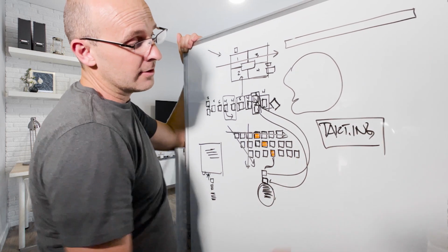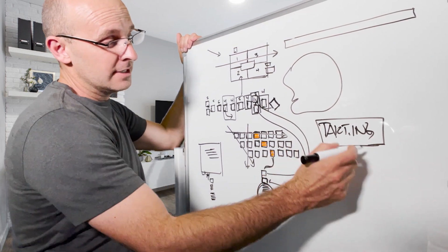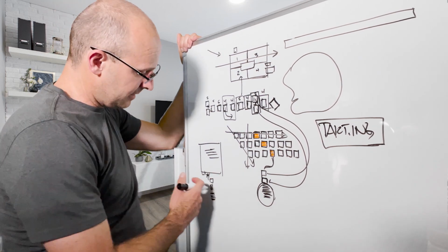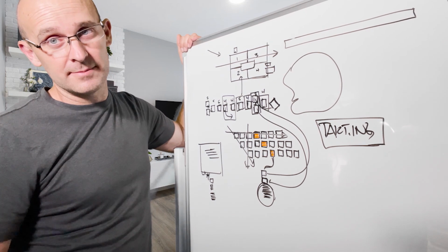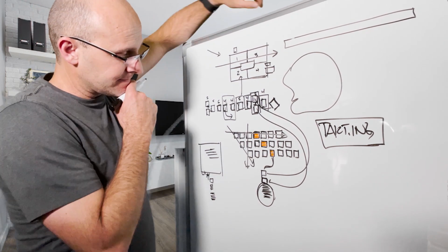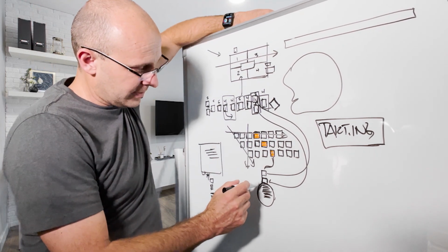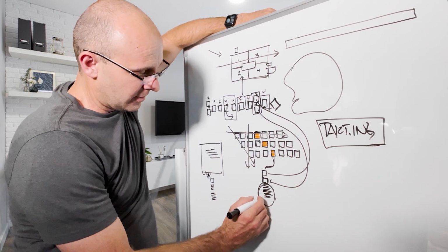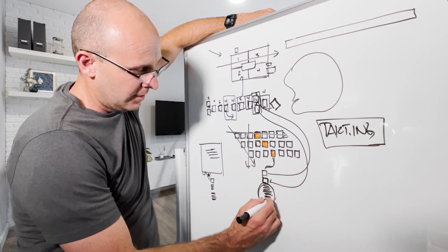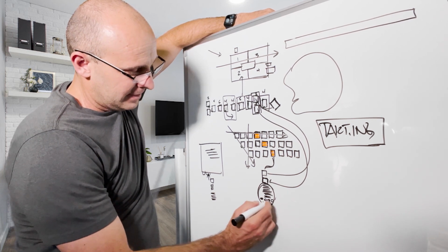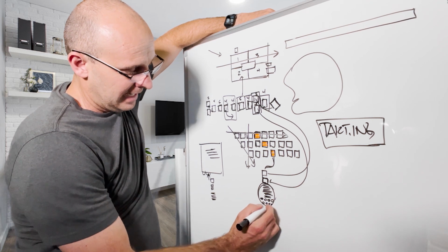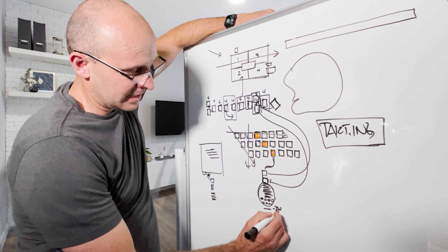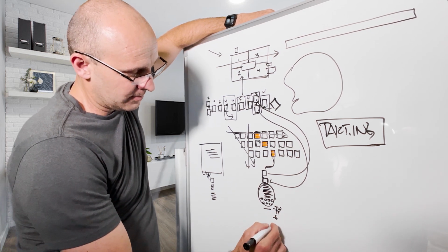So right there, our German friends developed this because some of the balancing and the manipulation of work steps in here really needed to be done in an application. So in that software, you'll create your work packages and your work steps, and then some of these work steps are preparation or defect or roadblocks. There will be different types of work steps, and on a work step you can put -2 Takt wagons or Takt times, or -6 or +4.